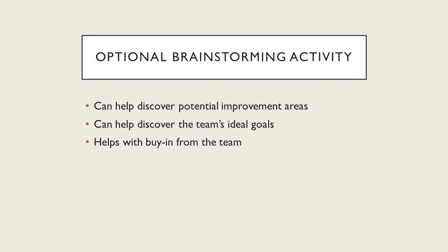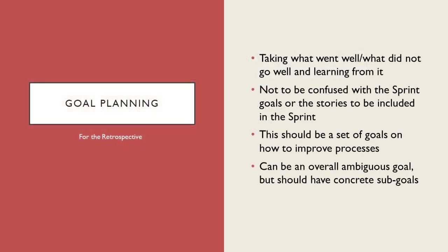After you've completed the brainstorming session and maybe narrowed down to 5 ideas for the next sprint, you want to get that commitment and the buy-in from the team, and if applicable, the stakeholders as well. So the development team or the design team, whatever team you are working on, you want buy-in on those changes coming from this retrospective. If there are any updates to the actual work itself based on these goals, you can definitely make them after the sprint retrospective.